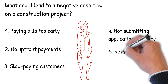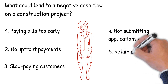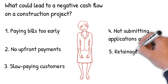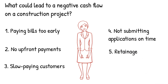Retainage. In the construction industry it is commonplace for the client to withhold paying a certain percentage of the total contract value until the project is fully complete. This is called retainage. If a company doesn't budget accordingly, this could lead to cash flow deficits.